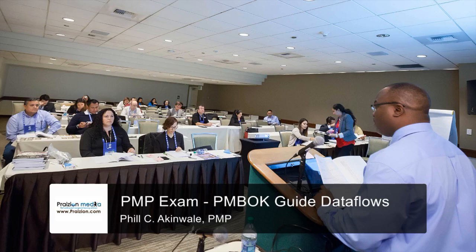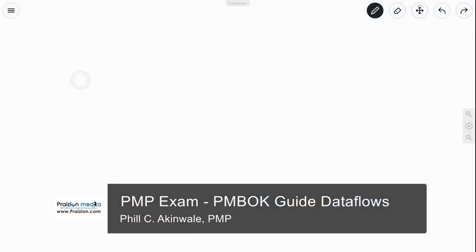Project management starts off with a document, with an authorization document. And this document is known as a project charter. Now, before you get the project charter, other things might have occurred. But the first process that we encounter in the PMBOK Guide is called Develop Project Charter.